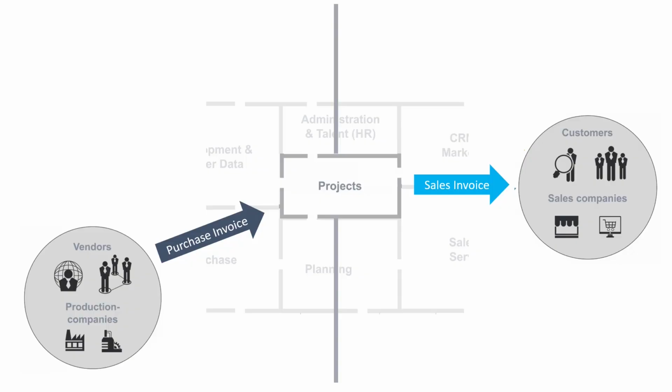So the intention is that we might have a purchase invoice from a vendor, and we want to register that in our project or our job, and maybe or maybe not convert it into a sales invoice. And based on our price setup on the job, we might add an extra markup or give a discount. But this would be the flow into the project from the purchase invoice, and then any costs created as a billable job planning line can be converted into a sales invoice line. And remember, the type budget will not be created on your sales invoice, only those of type billable.